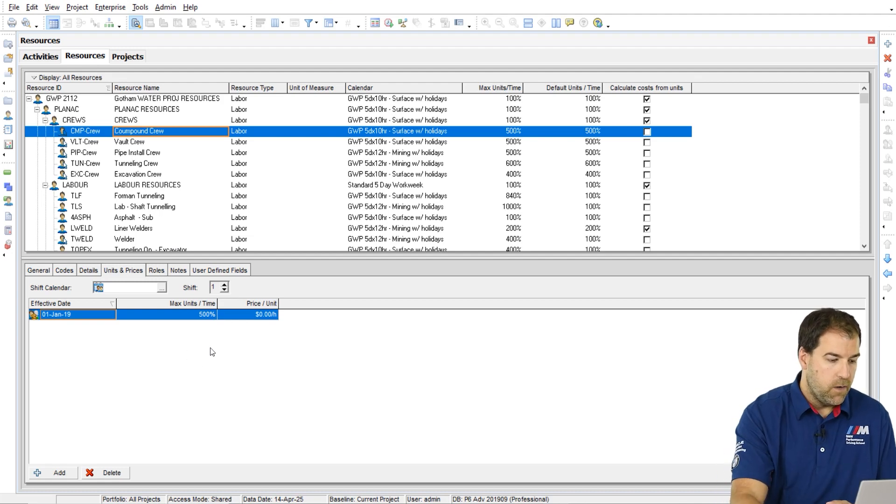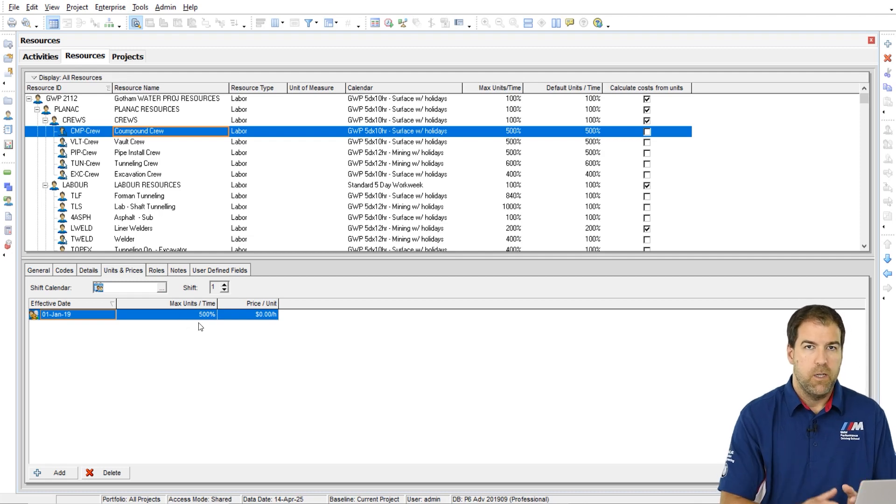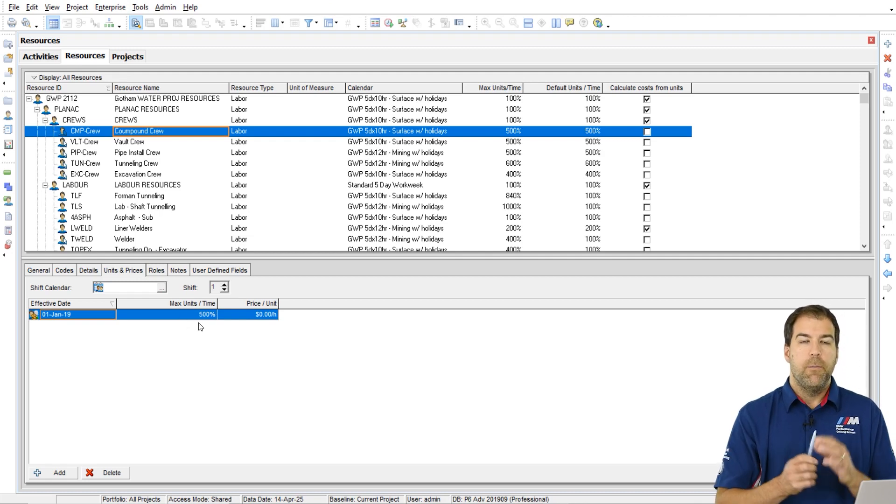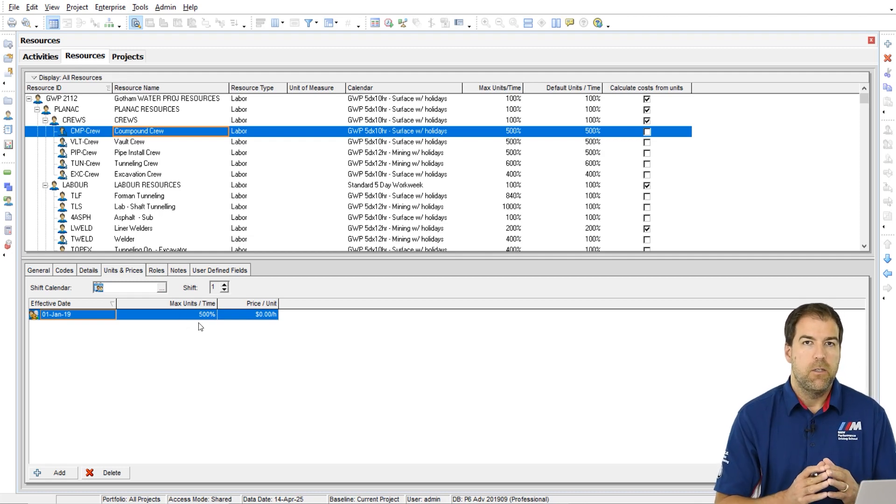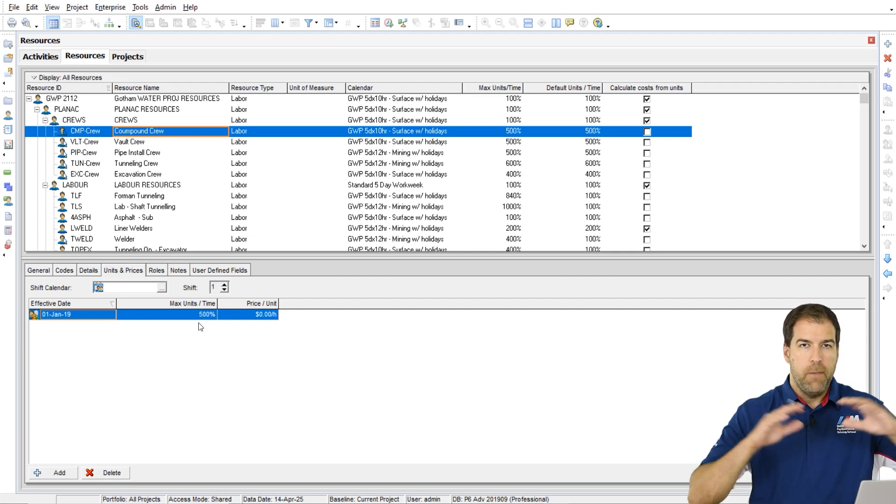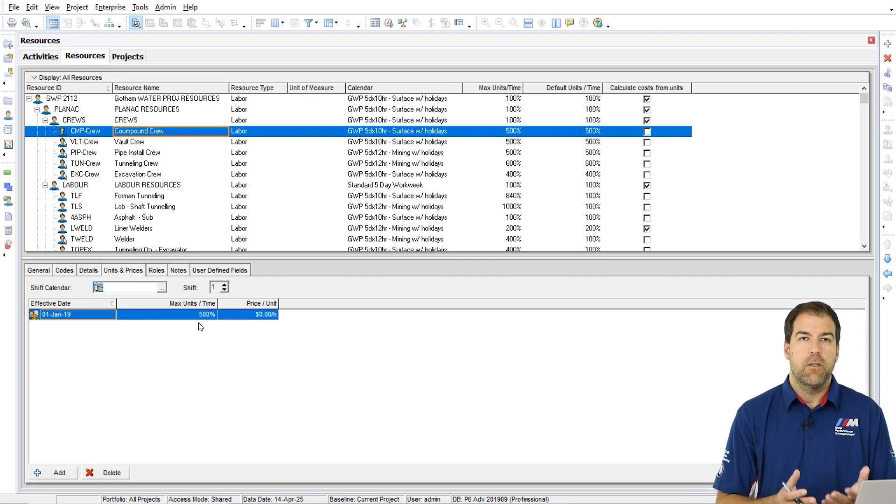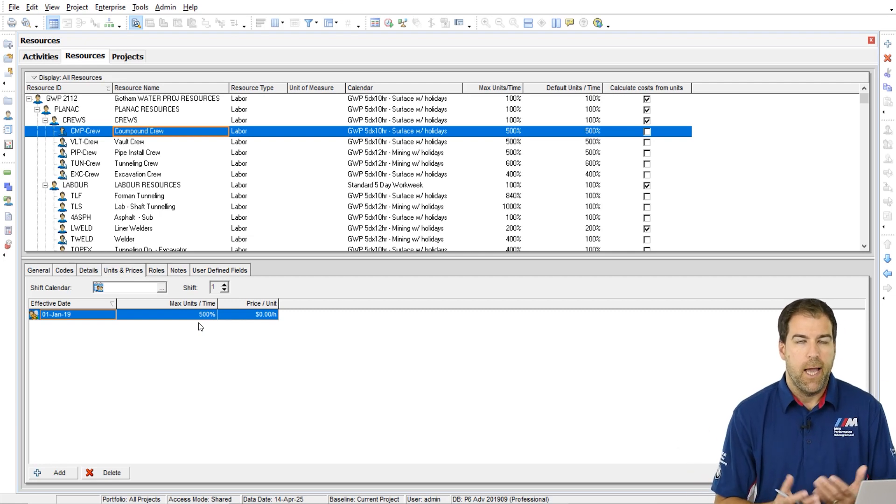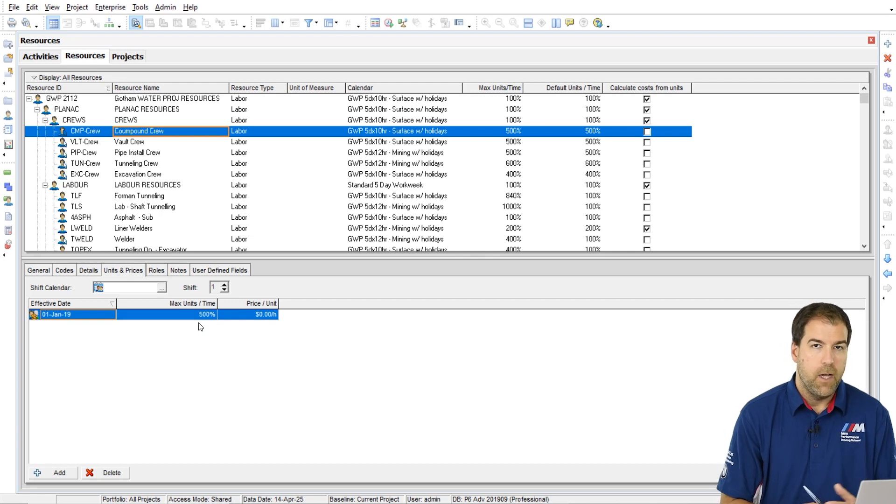So here we have the max units per time on the units and prices field displayed as a percentage. The max units per time field means, represents the maximum amount of productive capability I have from that resource. So it's set to 500.